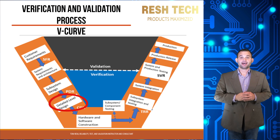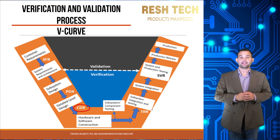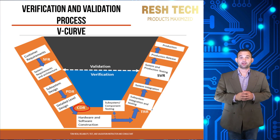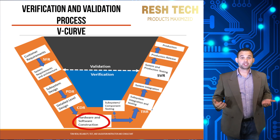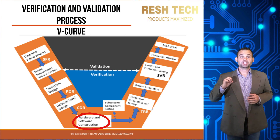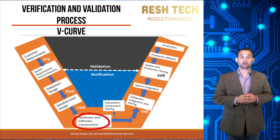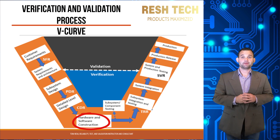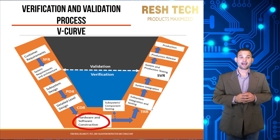After detailed level design is completed, a Critical Design Review (CDR) is performed. This is the last chance to dive deep into the design and ensure there are no outstanding issues before spending money on purchasing and fabricating parts. Next is the execution step, where software is coded, parts are fabricated or ordered from suppliers. Suppliers typically run tests to validate that parts meet your requirements as the OEM or subsystem supplier. Test fixtures and test harnessing are also built during this step to support upcoming V&V tasks.